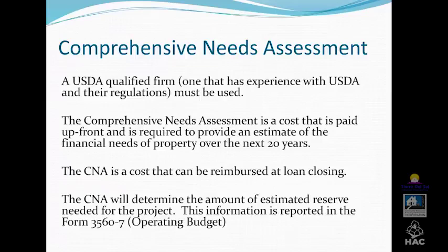But oftentimes it's a separate consultant, a green community or a green energy consultant. They need to be engaged in the project planning early on, because they are going to assure that all of your construction documents and specifications are going to be compliant with the requirements of your green component.